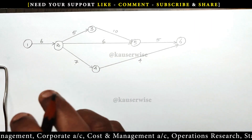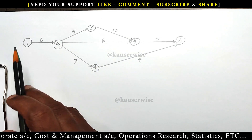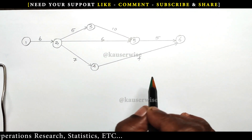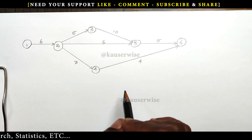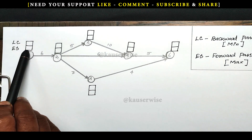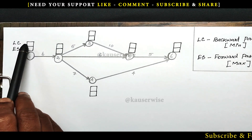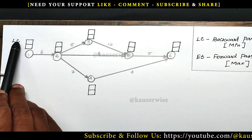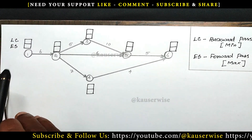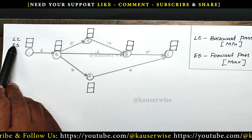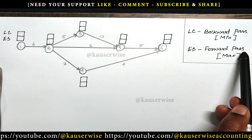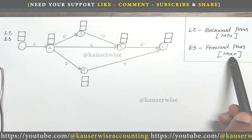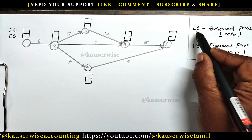Now the next step is we need to calculate earliest start and latest completion time for each and every node. This information is required in order to find out the total float. Here we have two squares — the lower square represents earliest start and the upper square represents latest completion time. We need to calculate earliest start time and latest completion time for each and every node. For earliest start, we need to do a forward pass. When we have more than one option, we have to select the maximum duration. First let us calculate earliest start time, then we will see latest completion time.